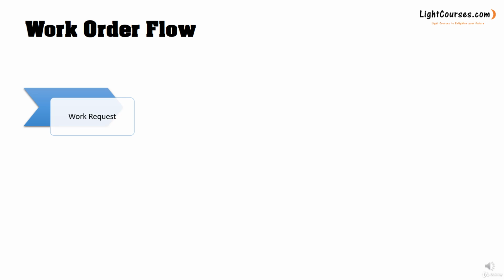The head of such a department is usually the person in charge of receiving the work request, because he has to do something else, which is the filtration or validation of the work request. Filtration or validation of the work request is a simple step which has to be done in order not to duplicate the work inside the CMMS system.